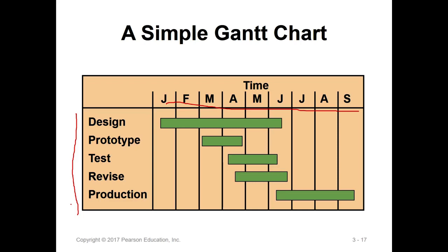So test is halfway of the start, halfway in the prototype, but almost close to the end of design. And in the prototype and the test stage, maybe we find some problem in the design, correct? Then we need to go back and tell the design team, you need to modify and recreate your drawing. Then you see these are all a part of the design stage. And then the revise even gives a little bit longer time compared with design. This is a finalization. And then production.